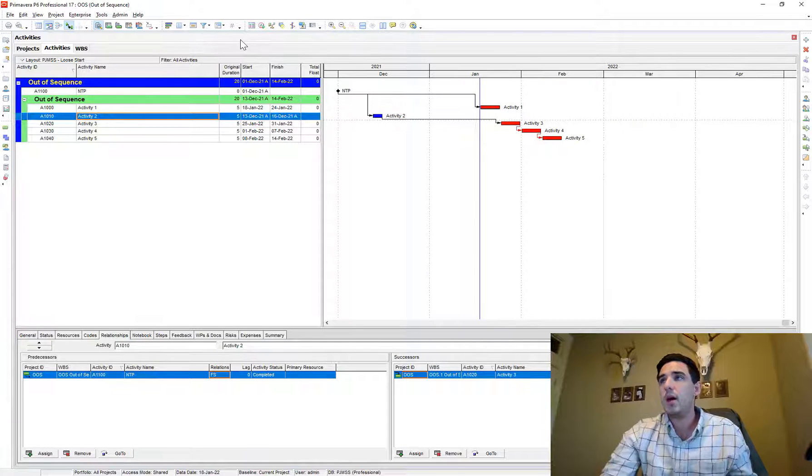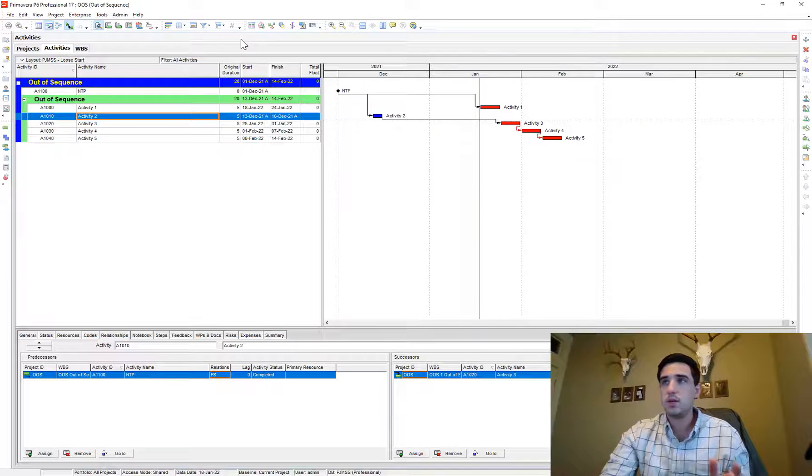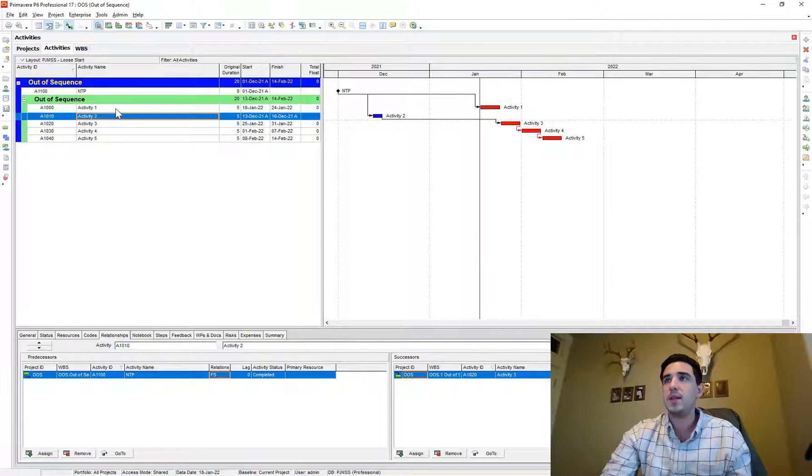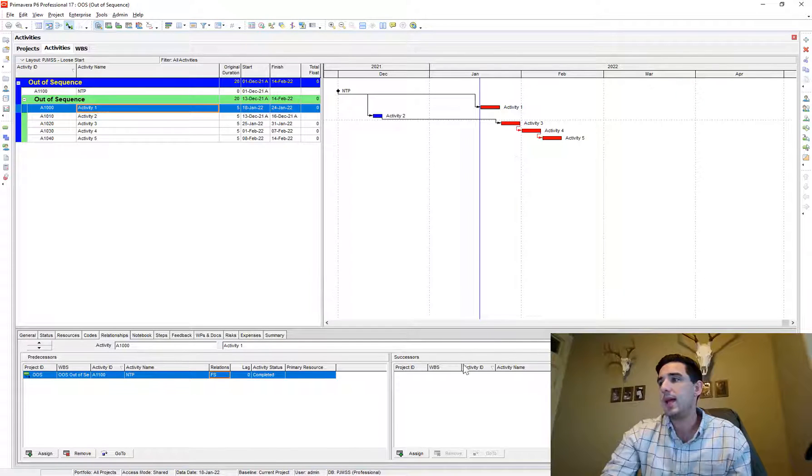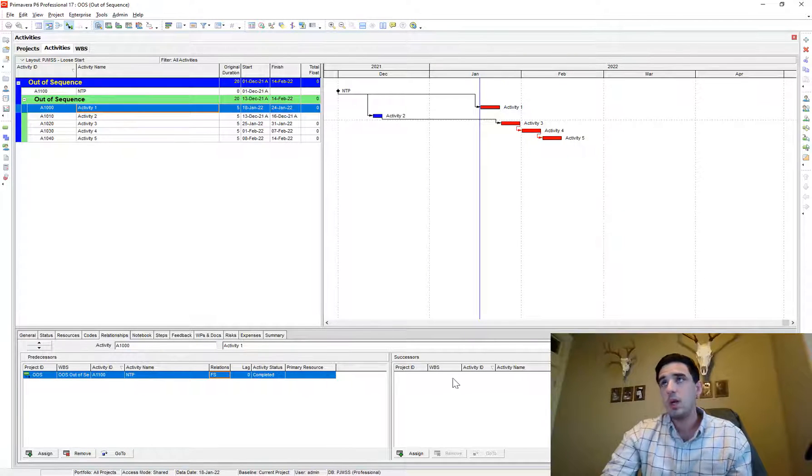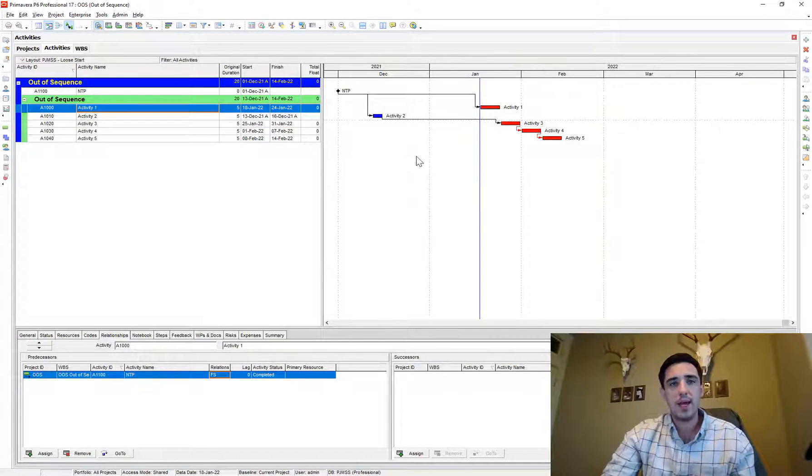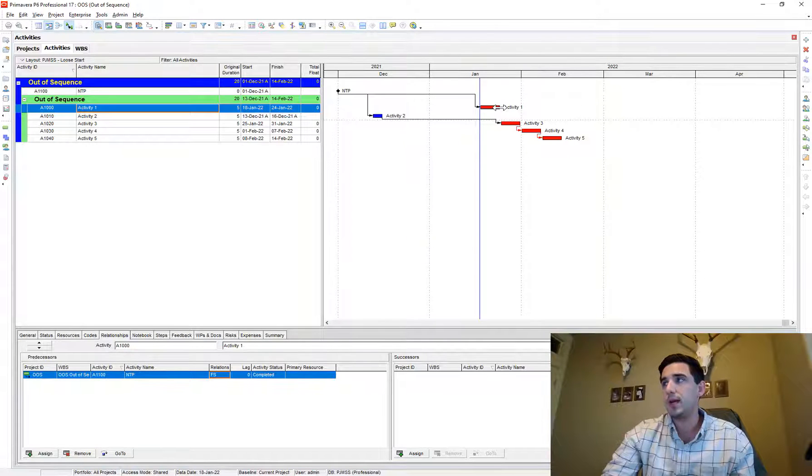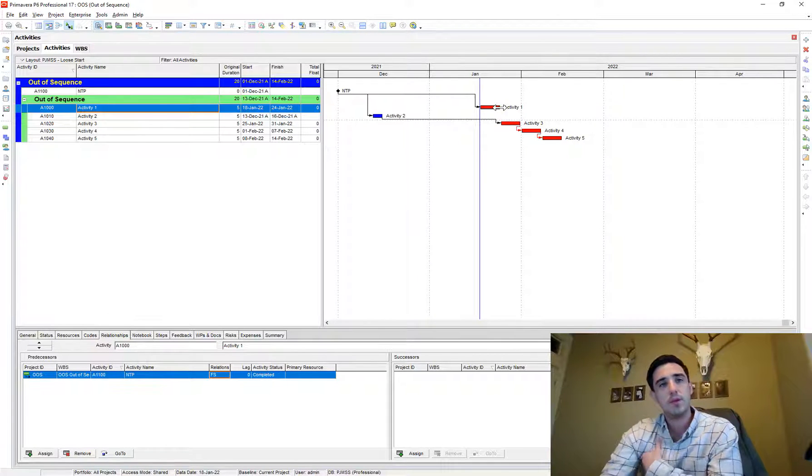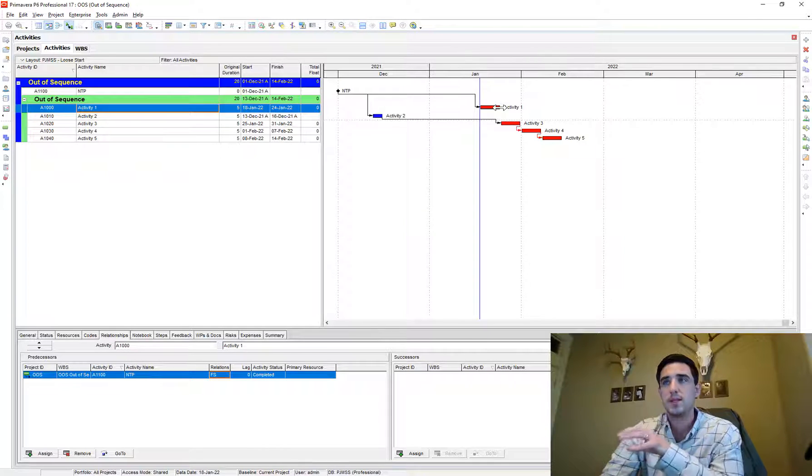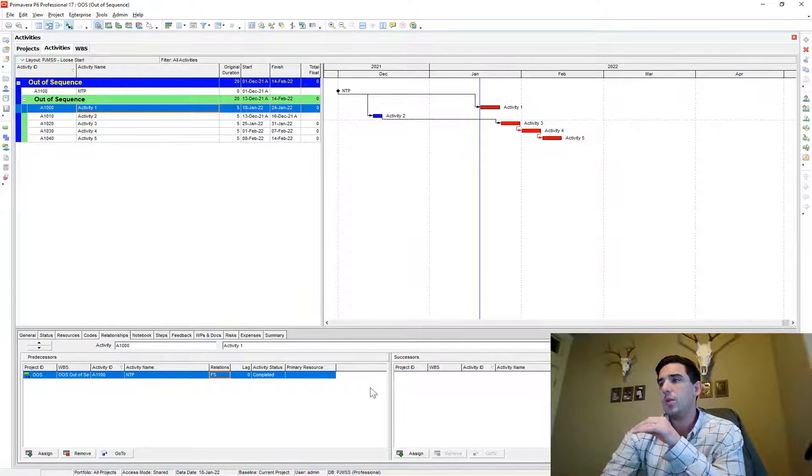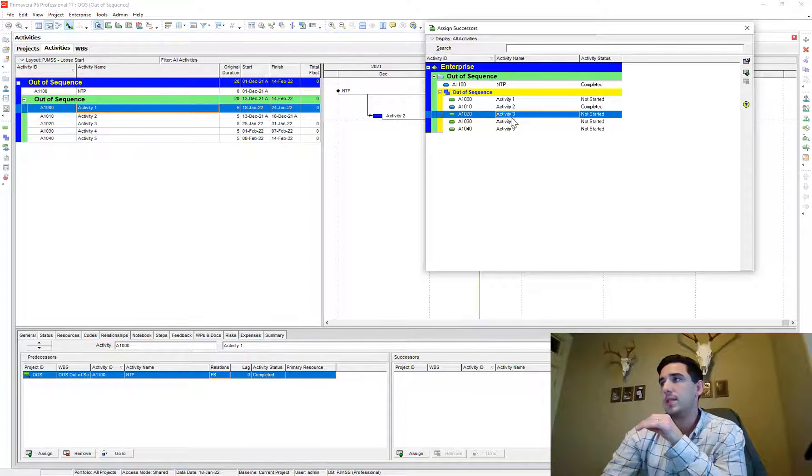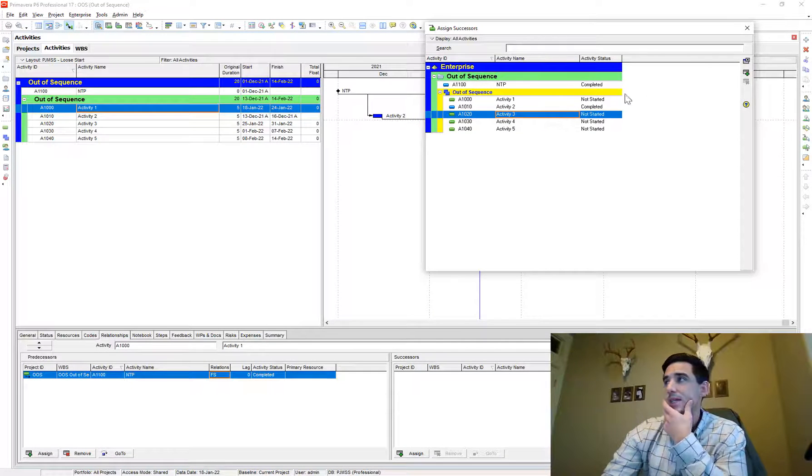Now the issue that this creates is I have to go back to activity one because I just broke that tie and I left that one without a successor. So I want to make sure that I have a logical tie after activity one to my schedule. I just want to make sure that that's properly tied in. So then I go to activity one and I'll tie that to the appropriate successor, which in this case I'll say is activity three.